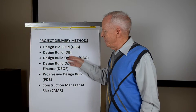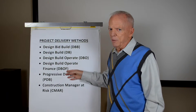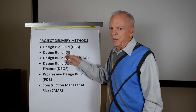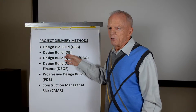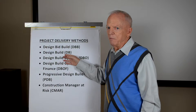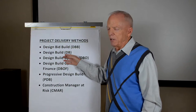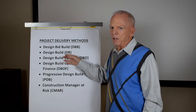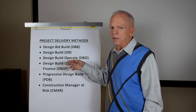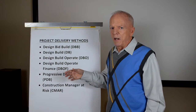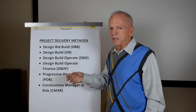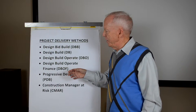So there's been a variety of alternative methods that have been used. One of these commonly used is design-build. In this case, the owner produces a description of the project, possibly even a 10% design indicating the concepts they'd like to see incorporated. Then there's a design competition where alternative designs are submitted along with a lump sum price, and the owner can then select the best value project, not necessarily the low bidder.